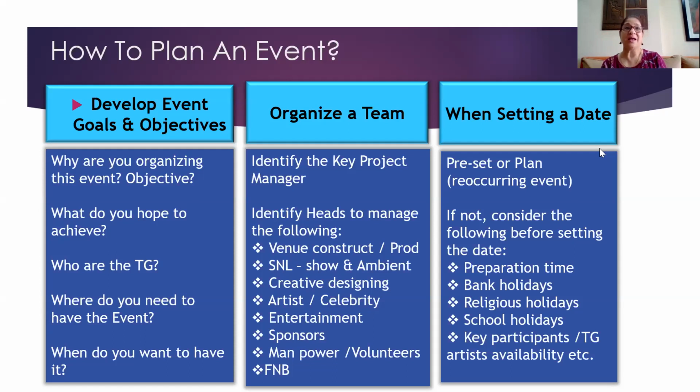That's why lights generally are perched up 2 days before the show. 1 day before the show, there's a proper sound and light technical rehearsal that happens, so that we know how we're going to be looking at this and how is it going to be looking on the day of the show.